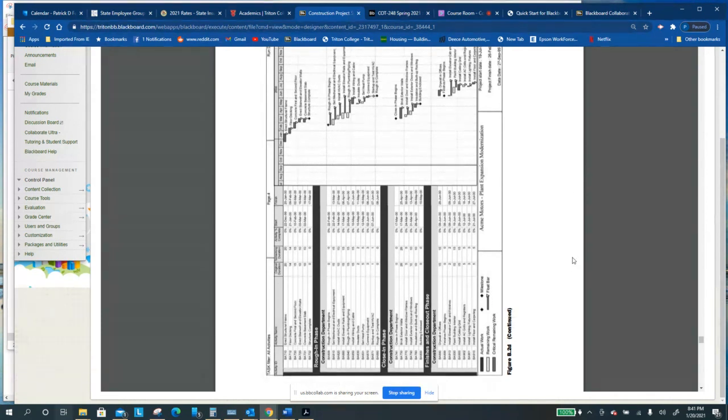There are different ways to do that. We'll get into that, and it involves the resources. You can add more manpower, but there are limitations to how much manpower you can add. If you're doing the electrical work in a space, you can't just say, I have 2 guys, it's going to take me a week, so I'll put 5 guys there and it'll take me 2 days.